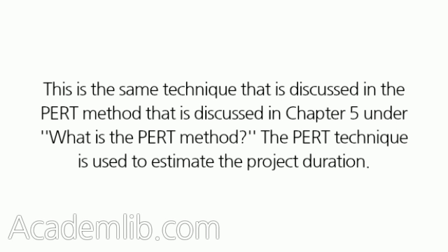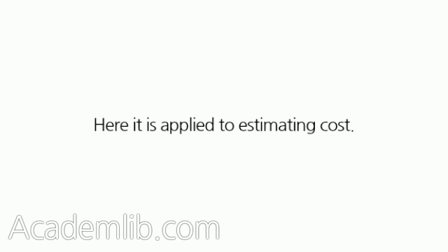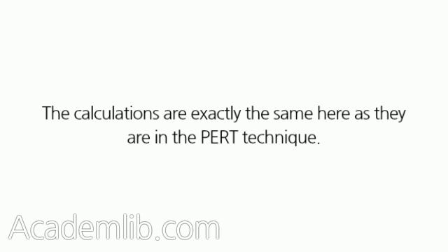This is the same technique that is discussed in the PERT method that is discussed in Chapter 5 under "What is the PERT method?" The PERT technique is used to estimate the project duration. Here it is applied to estimating cost. The calculations are exactly the same here as they are in the PERT technique.